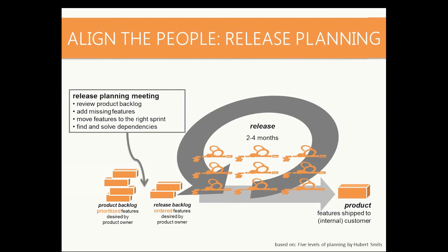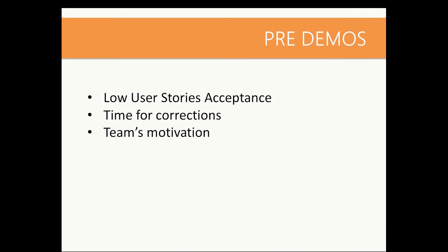Here we'll have an example of pre-demos. So you may ask, what are pre-demos? This is an example that we got with the first project. Since we have a large development project, we used to have one-month duration sprints. So that was a lot of work done, a lot of user stories, stories too big.